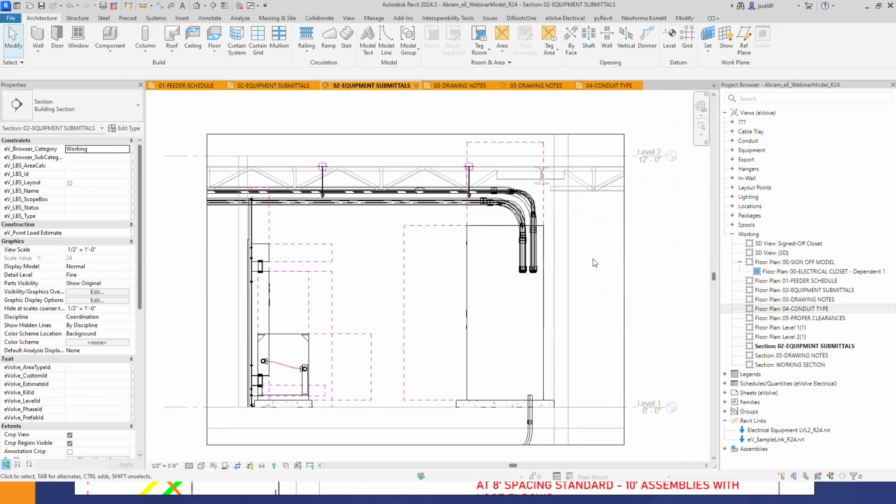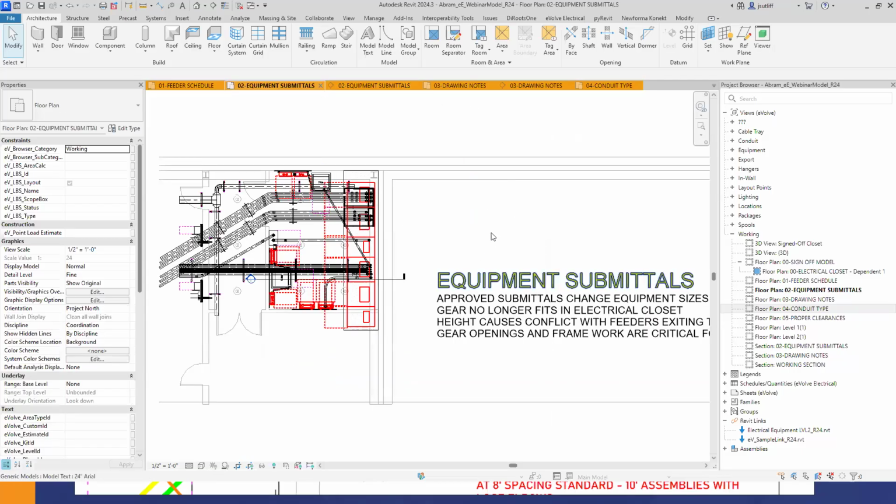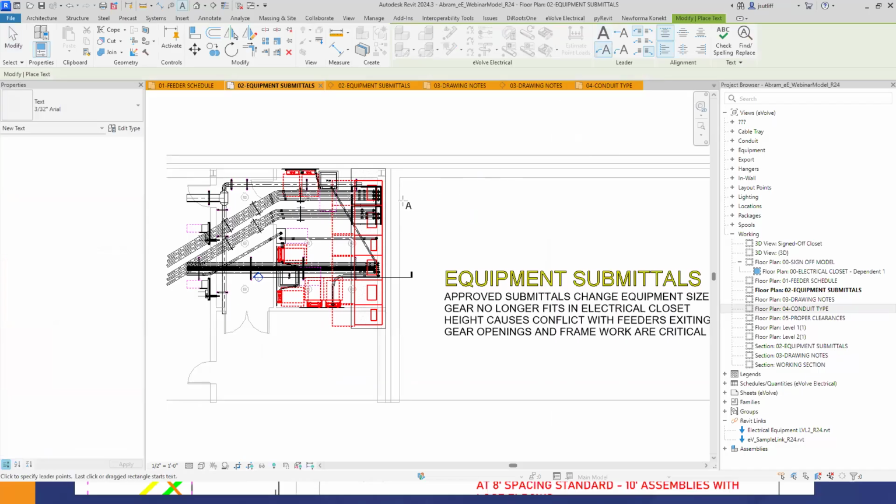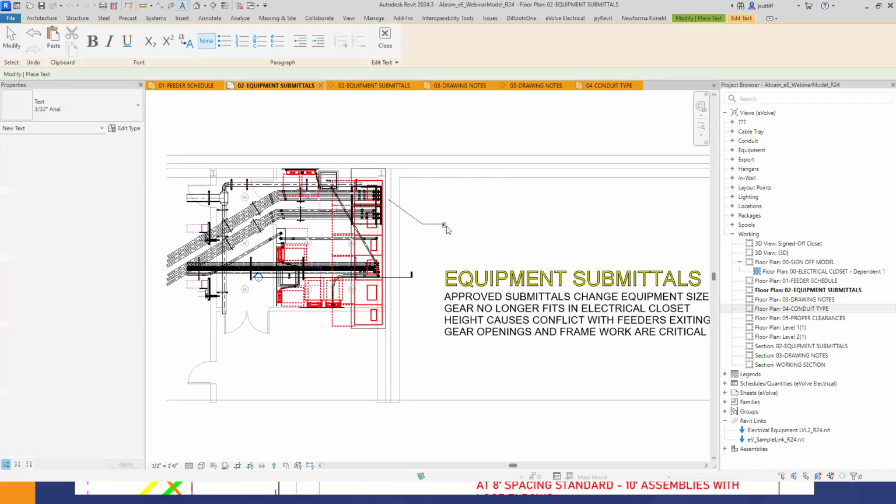the worst case scenario. And this is stepping out of the intent of the webinar, so I do apologize and want to reel it back in here a little bit, but that at least could get you a preliminary starting point. But then also have an asterisk in there and just say, make a note on your working view that this is preliminary.